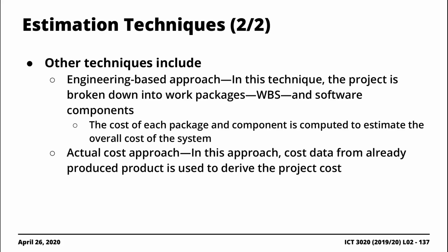The actual cost approach is somewhat different here. What you'd be doing is making use of information that you have associated with an already completed product, right? So you use cost and schedule details associated with this completed product to approximate how long the current project will take, and how much the current project will cost you.